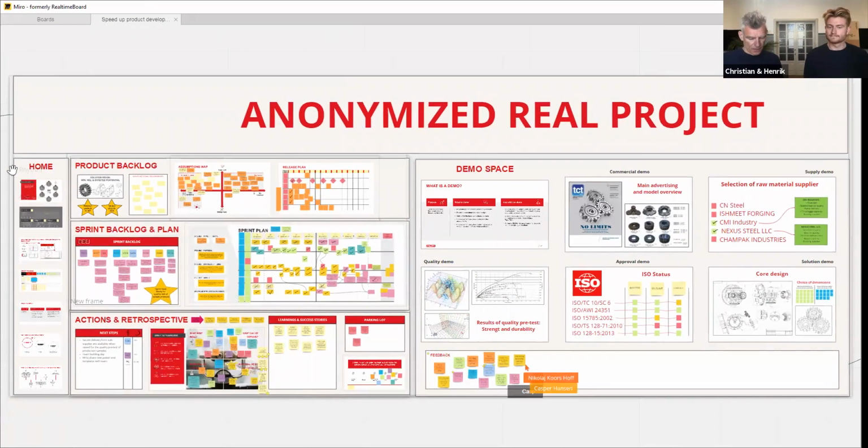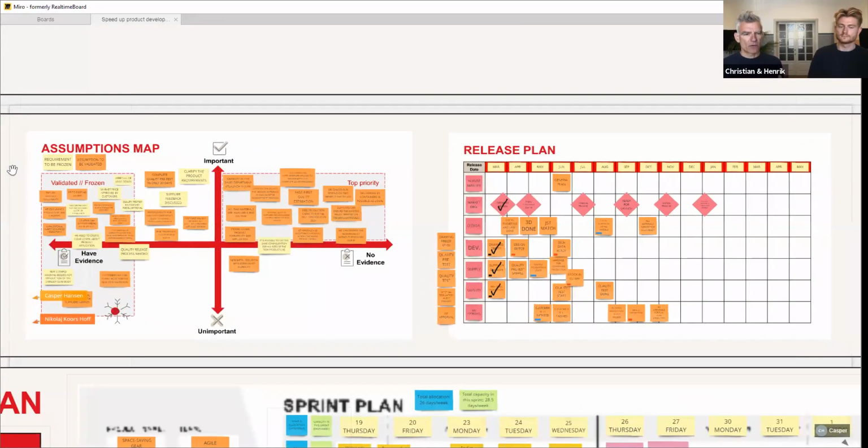Yes, let's move on now to the second event in that day, which is the backlog refinement. And the way it works is that in an agile project where we work with hardware or mechanical design, a backlog is actually the assumptions, the core assumptions that we have around requirements. That is what in software is called use cases, but it's also the release plan or the project plan, because we have a lot of long lead items. You gotta order tooling before you start production, etc. There are things that come in sequencing here.